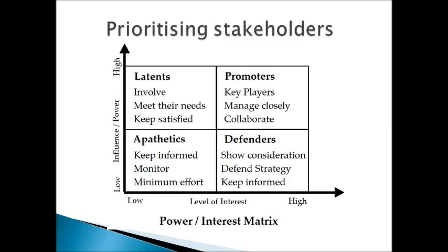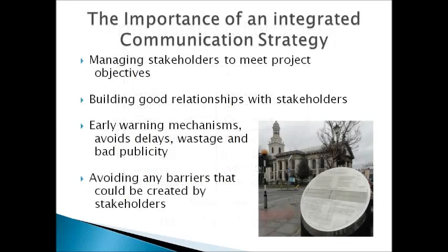The communication strategy helps us to target stakeholders, communicate key messages to them, and get appropriate levels of feedback from them. This helps to manage resources and timeframes. To coordinate the information of various groups, it is necessary to decide which are the most effective forms of communication, when they are used, and to whom. Emails sent to subcontractors may not get viewed for a day or two, so text messaging and phone calls would work better. Making sure everyone is aware of the order and timing of works will prevent one group of subcontractors being held up by another and causing delays.